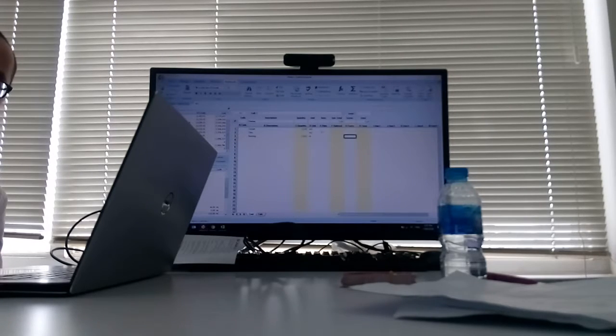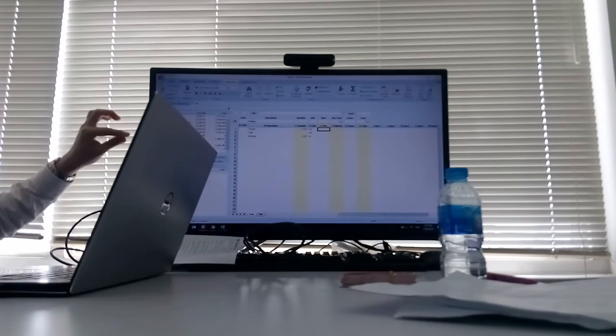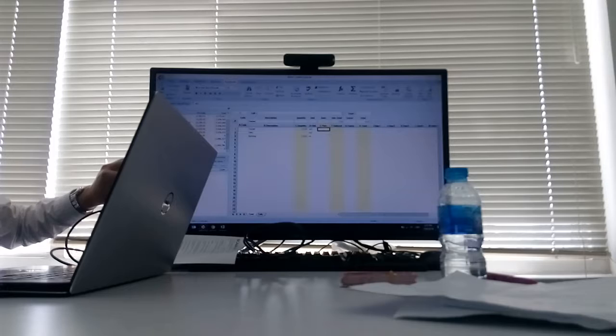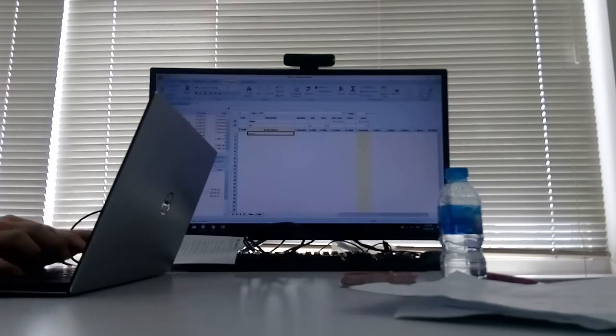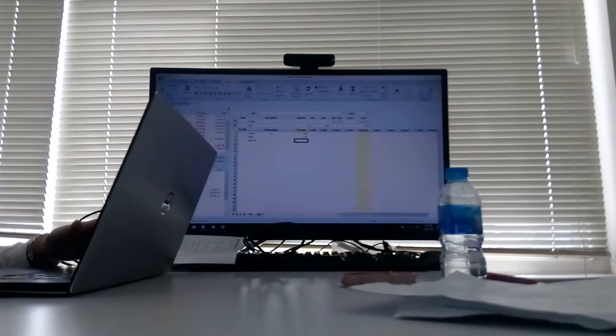Once you have completed all this, there is the rates. Same thing, you can have a rate library based on your previous project or quarter project, or any breakdown you created and saved inside. When you want to refer to this rate, you just select, look for it, and same thing, you drag it inside. To link it, you just drag and drop. If you prefer to do the breakdown, you can also double click, then do it yourself: labour, plant, material, how you want to link it. This is also up to you to do the breakdown.